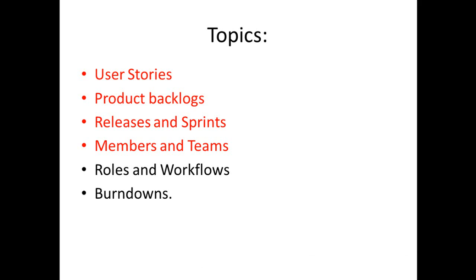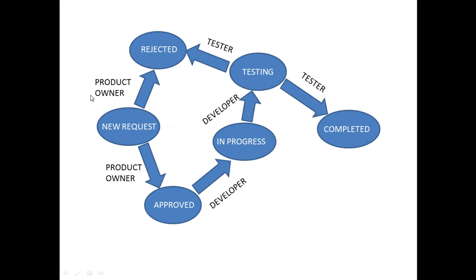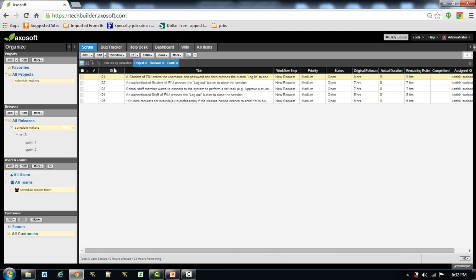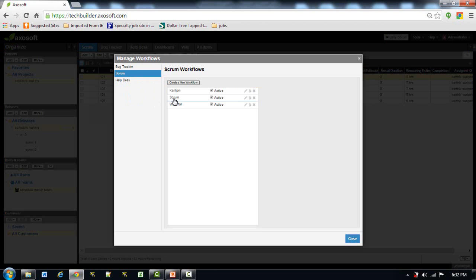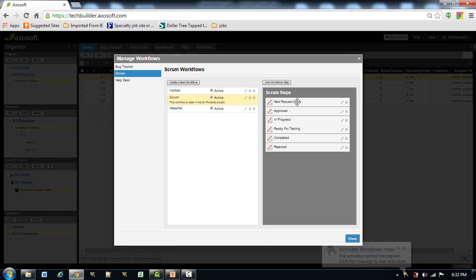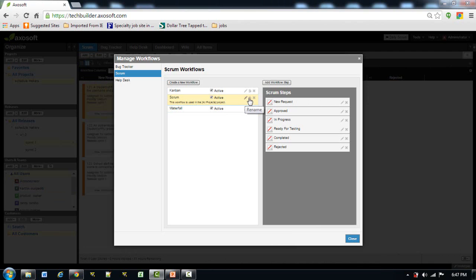Now that we've assigned members and teams, we'll see how to assign custom roles and custom workflows to follow the agile principle. For example, in this workflow: from New Request, the product owner will either approve or reject the user story. When approved it goes to In Progress by the developer, then from In Progress it goes to Testing. Testing can be rejected or approved, and when approved it goes to Completed. Initially Accessoft doesn't provide this infrastructure — we need to create it by customizing our workflows. To customize a workflow, go to Manage Workflows.